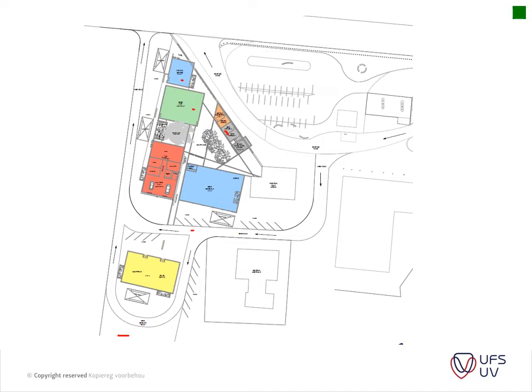As your square meter dimensions get smaller, the higher the rate usually becomes, just because of the amount of work that goes into it. If you think about a guardhouse, the rate per square meter is quite high, although there's not that much detail that goes into it, but it still needs a strip footing, earth filling, a wall, a roof, some electrical installation. That is the type of consideration when you do your per square meter rate build up. And then obviously applying that.